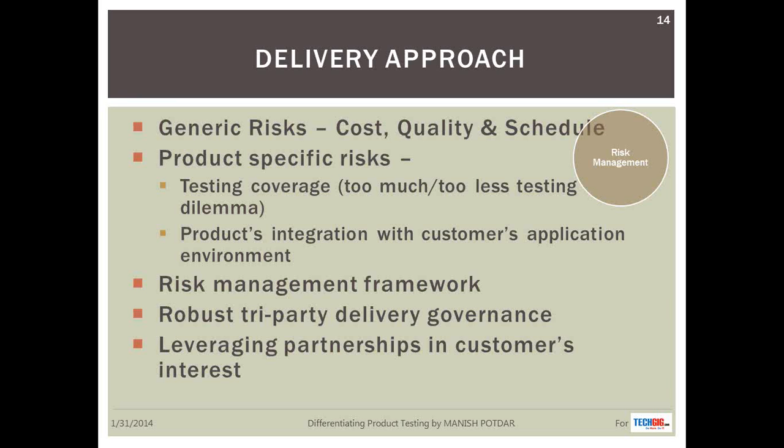The generic risk identification will always be there. You would have a risk of cost, quality, schedule continue to exist, but there are very product-specific risks which need to be managed for delivery excellence in product testing. Typically coverage. How much you test. If I have an interfacing application for the product in the bank's environment, and that interfacing application has been owned by a third party and tested by a third party, to what extent, me being responsible for testing of the product implementation, to what extent do I need to test the interfacing application?